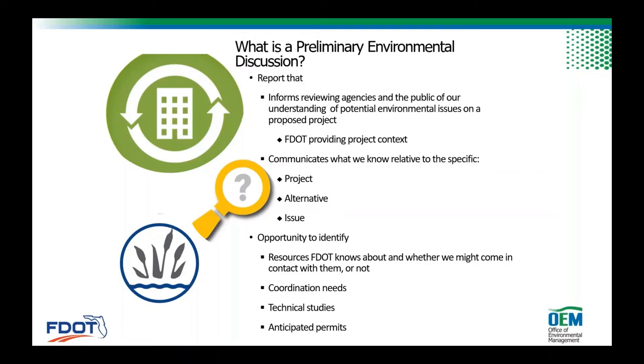They're used for the advanced notifications that go out in programming screen. These preliminary environmental discussions are actually used to support the summary report, but also they become the environmental setting piece of the requirement for the advanced notification. So you do it once and it's actually reused in multiple spots.